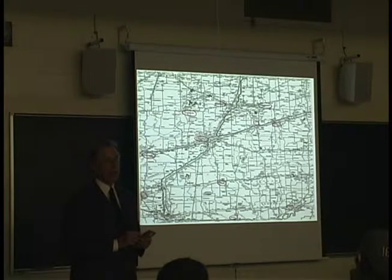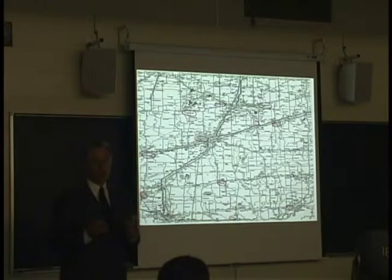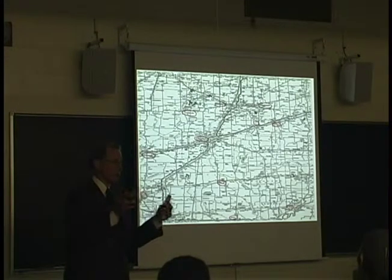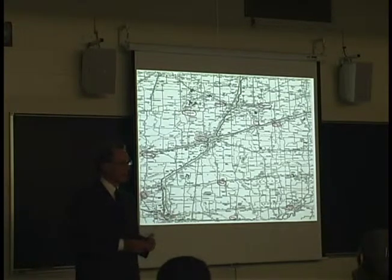Paving, at least in the asphalt business, is controlled by your plant locations. Just like in the ready-mix business, you'd be controlled by your plant locations. As I indicated, asphalt will remain hot where it's usable for about an hour. You mix it, drop it into a truck, haul it somewhere for 30 minutes, get it into your asphalt paver, get it spread, get it compacted. That's about an hour. That's kind of what the state looks like.